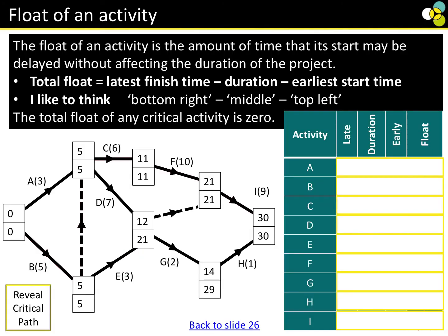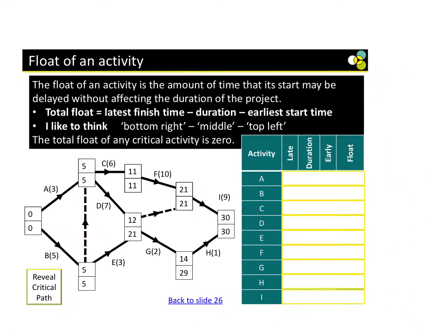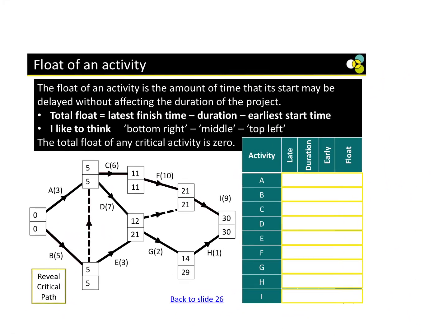Right, we're going to look at float of an activity. Now, I just want us to imagine, this is what's happening. Now, to determine if, sometimes, as we've just seen then, we know that if the early event time equals the late event time, it is a critical activity. Sometimes they'll give us questions where we need to physically work it out. And we can work it out.